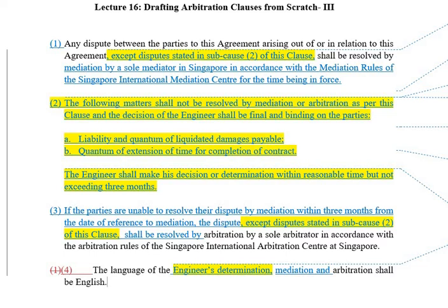On termination of the pre-arbitral procedure, how will arbitration get triggered? The arbitration is usually triggered through an arbitration notice when the dispute resolution through mediation fails. So that is provided in the relevant arbitration rules. In this case, Singapore International Arbitration Center. So we need not worry about it because that is covered in the rules itself.